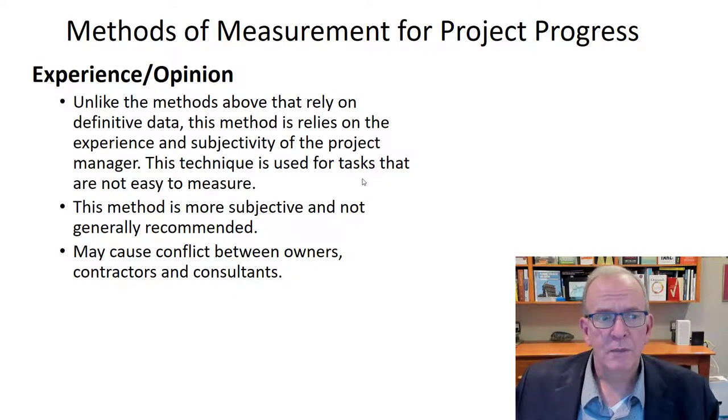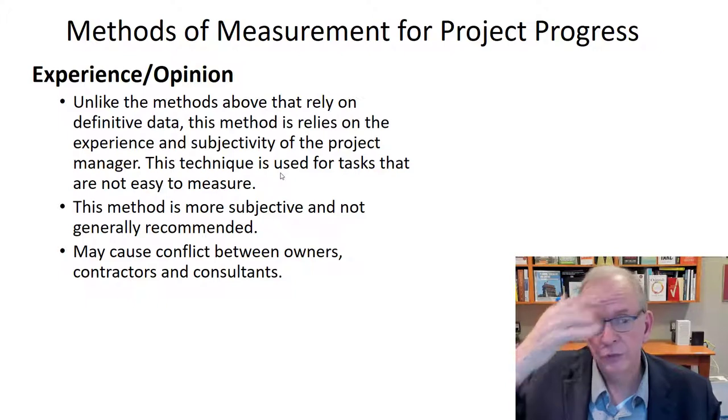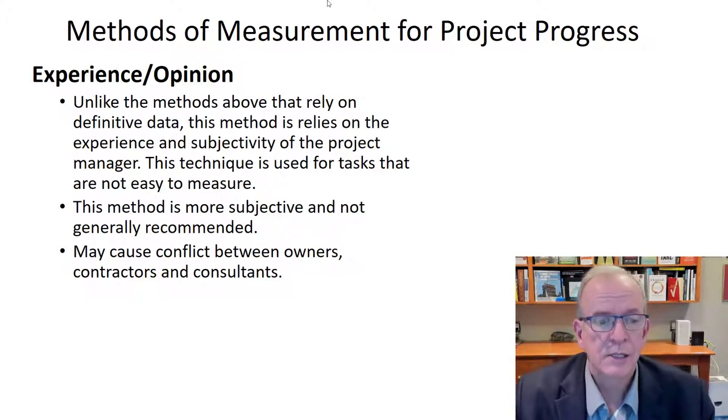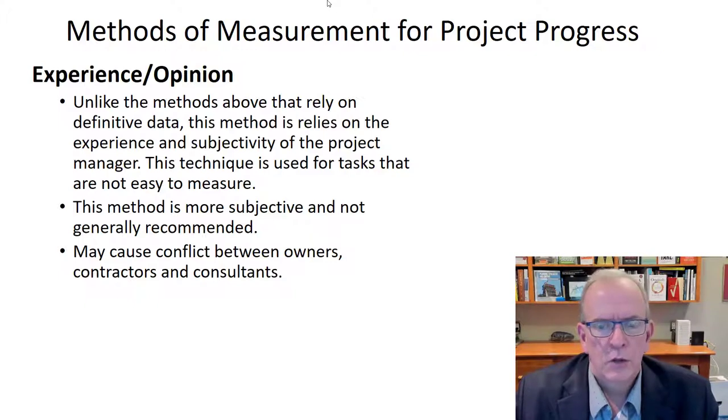On the experience option, this is where you look at it, if you're experienced, and you just say how much you've done. So you look at it and you use your experience. To be honest, a quantity surveyor probably wouldn't agree with me on this, but on certain items, you don't have units to measure, you don't have cubic meters, square meters, that sort of thing. It's a little bit harder to quantify. And in those cases, you tend to use the experience option.